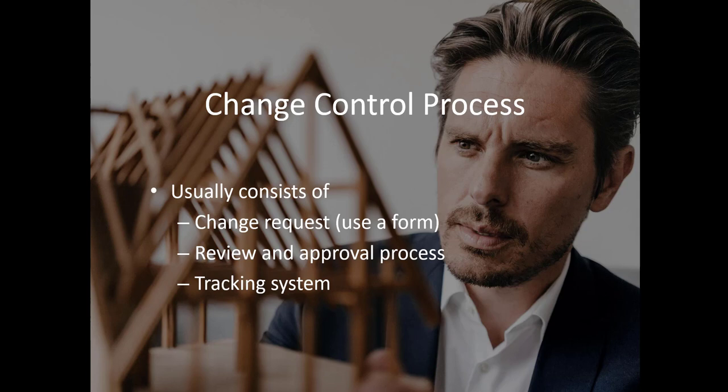Once the change request is documented, it is submitted to a change control board. A change control board is a group of people who consider changes for approval. Not every change control system has a board, but most do. Sometimes the change control board can be a project management team. Sometimes the project manager takes it to the stakeholders and they review it. Sometimes there's a group, like a designer, a project manager looking after the owner, and the site contractor. So these change review boards can be a bunch of different people.